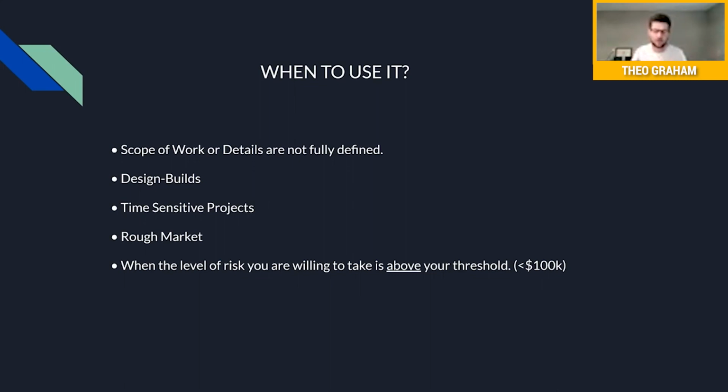Some people, it's all over the map. For me, it's about $100,000. Under $100,000, I can quote that pretty well. I'm comfortable in that space. Under 100K, I can quote that profitably. I can monitor that. I can nail that. I can do my postmortems. I can track my actuals, and I can execute a job at about $100,000 with all of the what ifs and contingencies and risk mitigated under that roof of $100,000.